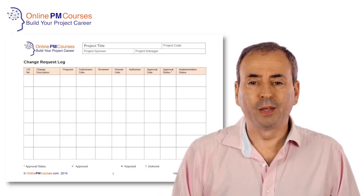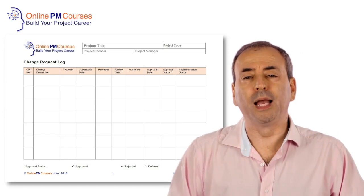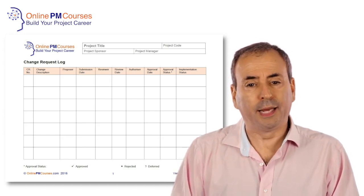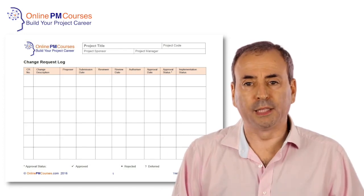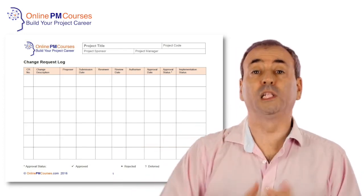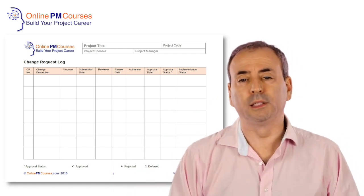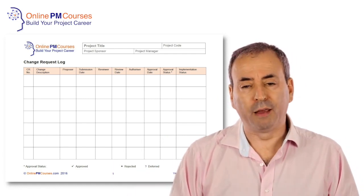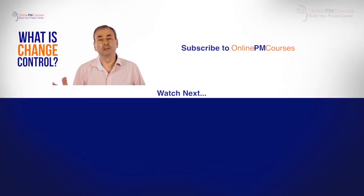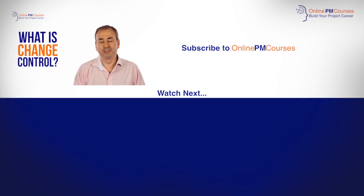Whether there is a change to be made or whether there isn't, every request goes into a change log which details the request that's made, the timings, the people concerned, the decision, and the implications for the budget and the schedule and anything else. That change log creates your audit trail of all the changes and the decisions that are made, who made those decisions, and where we can find the evidence on which they based their decision. That, in short, is change control.